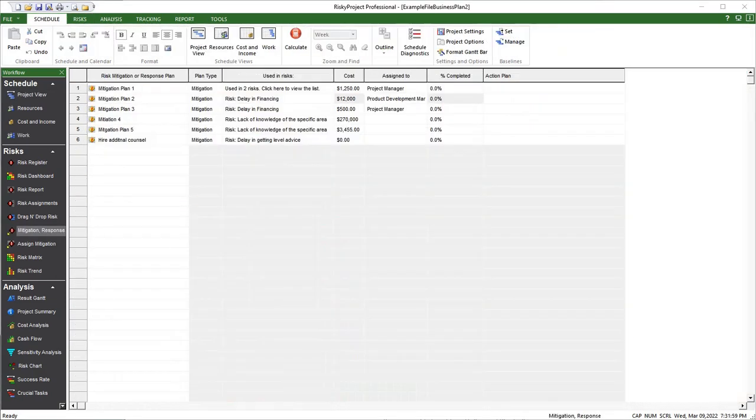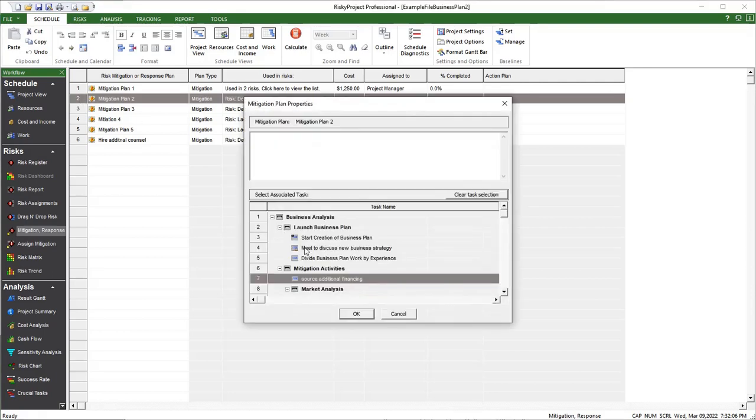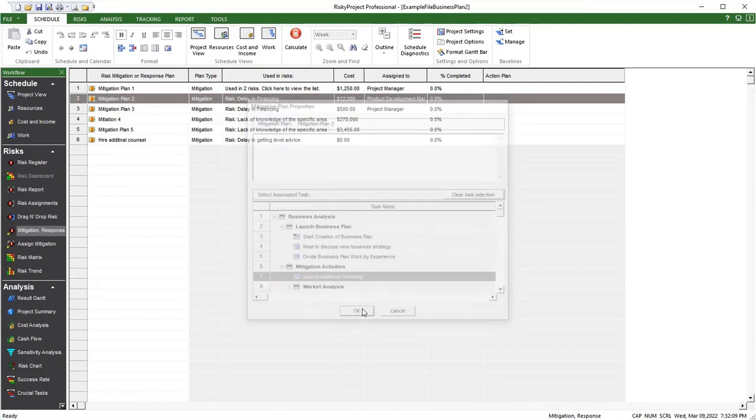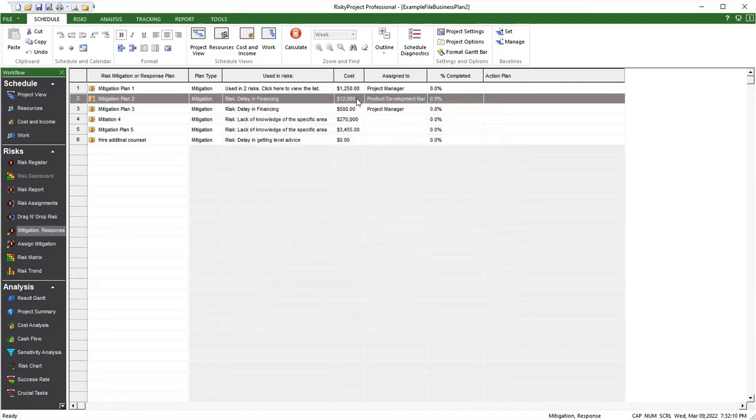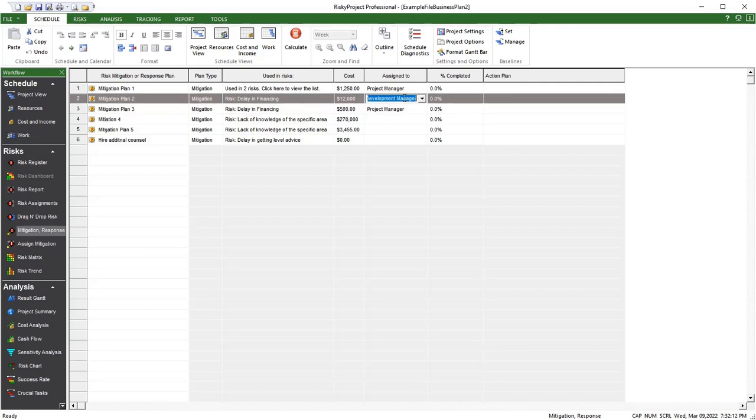Risk Mitigation Workflow Improvements. Mitigation Plans can now be linked to tasks or a group of tasks within a project schedule. This linking will read the scheduled data into the mitigation plan to calculate costs and plan actual start and finish times.